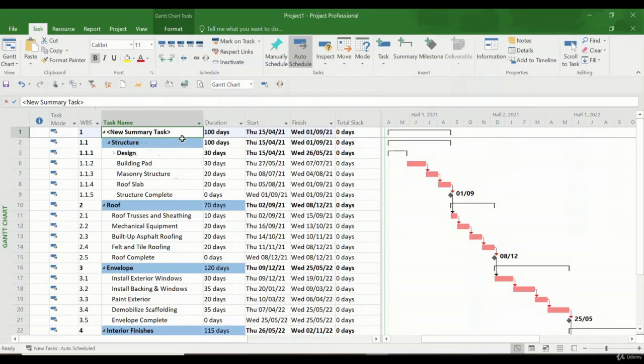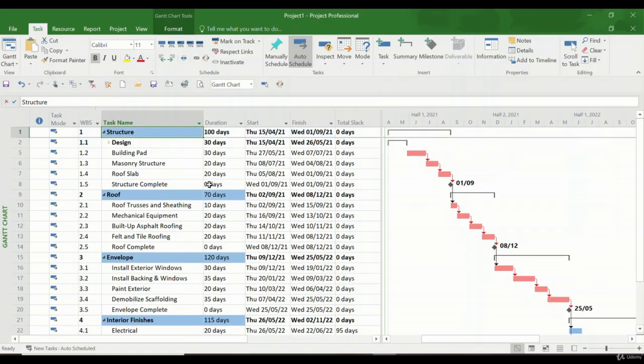the top of the table, and the other task, which was the structure, goes one level lower in the WBS and falls under this task. So these summary tasks are good, for example, to manage and categorize several tasks when you want to see the duration. And the fun thing is that if I add this summary task, it makes the duration of all the following tasks underlined. So I press Ctrl Z for the moment.